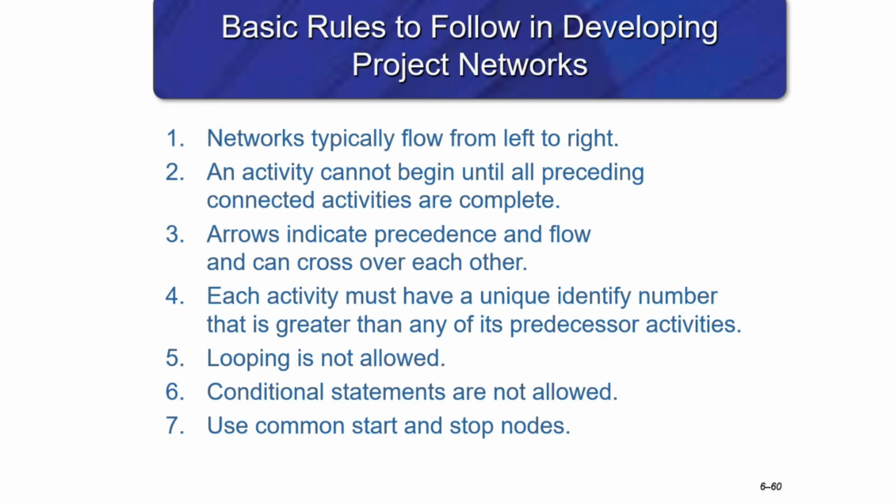So no conditional basis. In project scheduling, this must be certain. If a conditional situation occurs, then they can't really produce that schedule because you don't know which way that condition would lead. And use common start and stop nodes. Okay, so these are some of the rules in drawing the network.